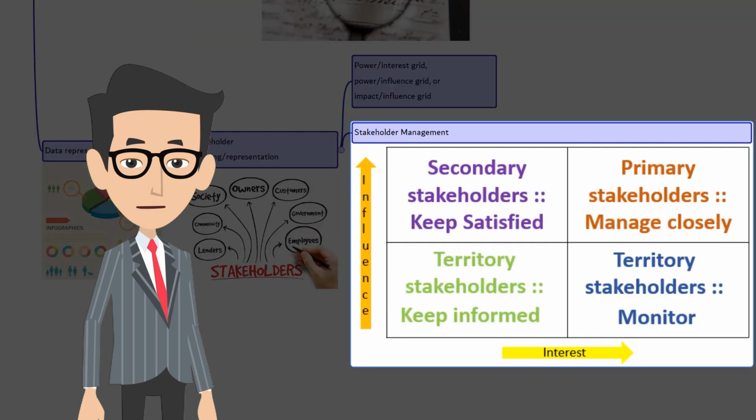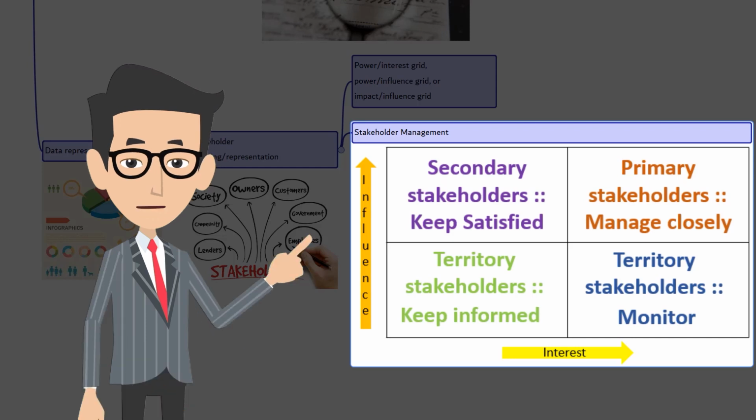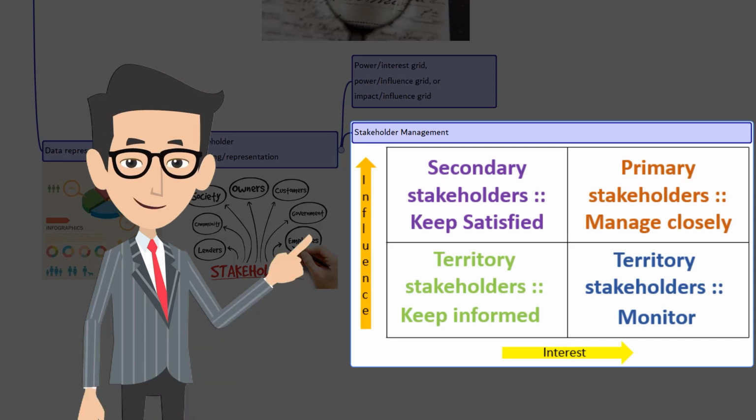Each of these techniques groups the stakeholders according to the level of authority, which is power; level of concern about the project outcomes, which is interest; the ability to influence the outcome of the project, which is influence; or the ability to cause changes to the project planning or execution. These classification models are useful for small projects or for projects with simple relationships between stakeholders and the projects, or within the stakeholder community itself.